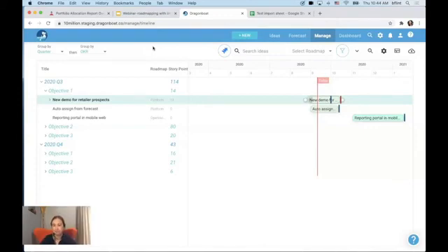Right. Yes, so this is exactly right in that you do top-down planning. Today we do only weeks. We will build things like story points, and that will give you the same measurement when you do bottoms-up. Bottoms-up will add up all the stories. Top-down is the budget story, right? So you can see the two things progressing and how they come together or stay apart, so you can manage stakeholder communication expectations by seeing them easily in one place.